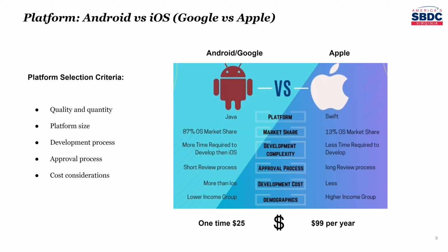The approval process also varies between these two platforms and companies. To get approved to the Android store, it can take just 24 hours. Sometimes the Apple store will take longer, a week or even up to a month. So if you're planning on a quick launch and some sort of big launch event, you will need to plan accordingly for that process to get accepted into the App Store.